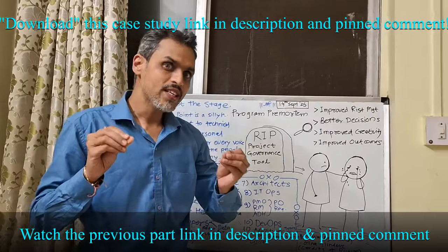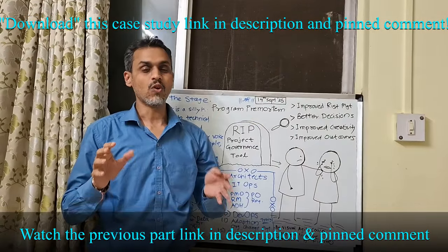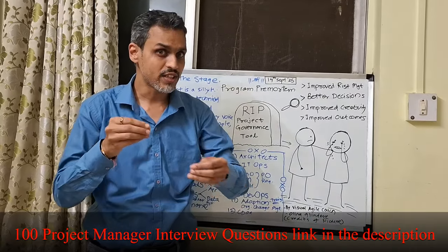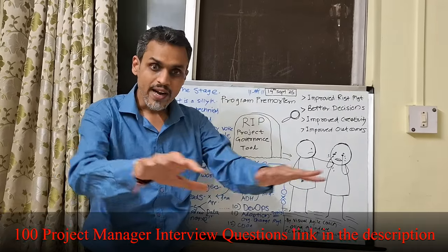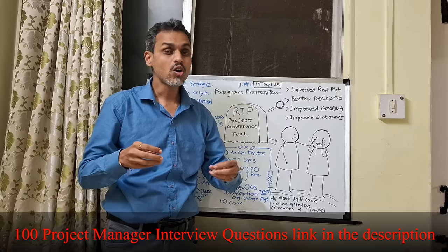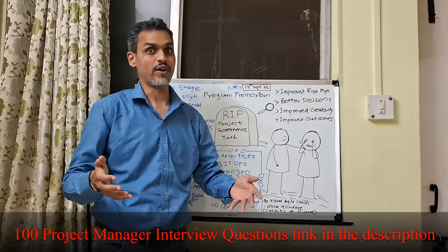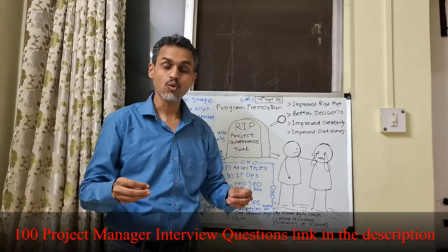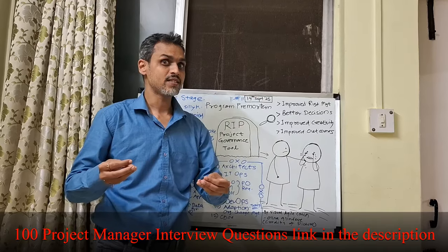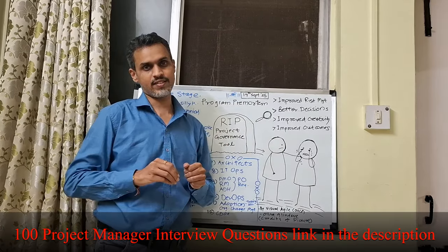Yeah, so in this pre-mortem analysis, what we do, even before the actual project is started, we gather a variety of stakeholders and then ask them what could be the potential failure points that could cause the project to fail. Yeah, so this is the pre-mortem analysis. I thought of doing this.